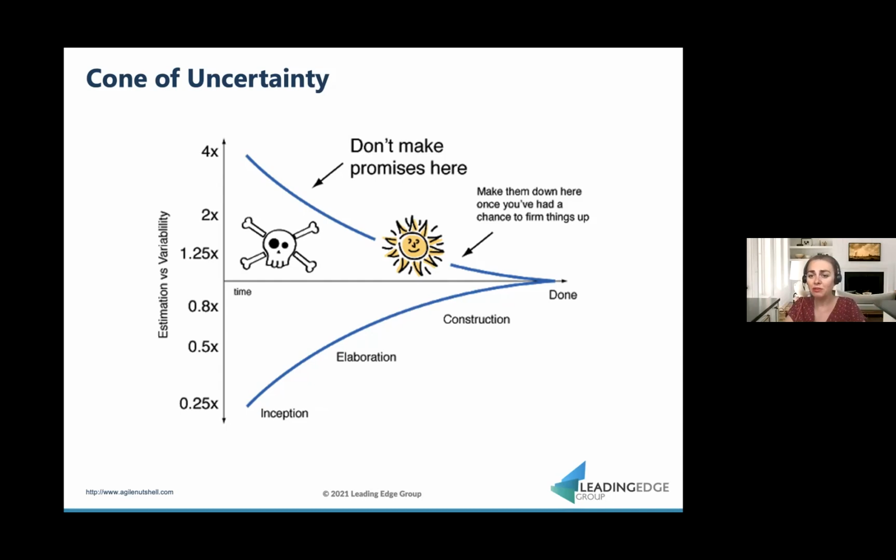So for example, if you know that you have to deliver something by that timeline, as you are going, you will be negotiating and thinking about what's absolutely crucial and must be done, and what can slip beyond the timeline. But that's the mindset: when you have a timeline locked, the scope cannot be locked. Or if you have a scope locked, the timeline has to be flexible. So you can have only 2 constraints out of 3. And the quality is embedded in the development process, in the creation process. So you never jeopardize on quality.